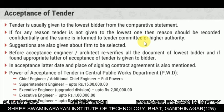Power of acceptance of the tender in the Central Public Work Department: Chief Engineer and Additional Chief Engineer have full power. Superintendent Engineer can accept up to 15 lakhs. Executive Engineer (upgraded division) can accept up to 2 lakhs. Executive Engineer can accept up to 1 lakh. Assistant Engineer is up to 10 lakhs.